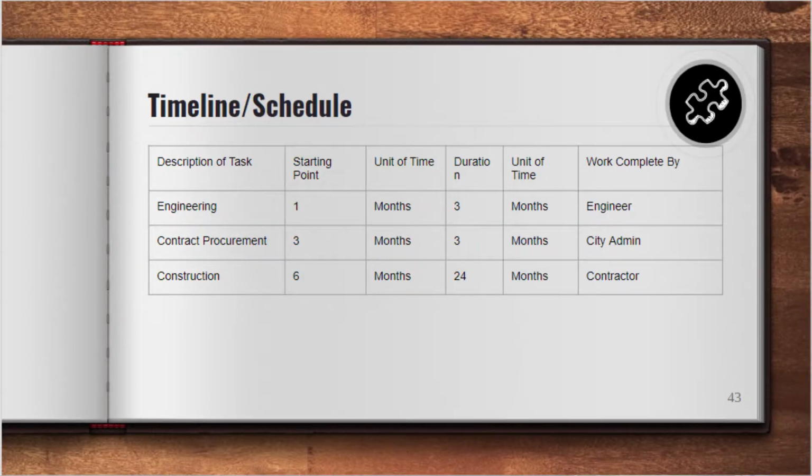Copy of the table, and then say, this is what we're going to do. We can only do construction in the summer, so that will affect your timeline. Put those little things in there so we're aware of that. It makes FEMA aware of it, because then FEMA knows if they don't award the grant until like November, well, you're not going to start construction until May or whenever the snow clears up. So that's just good information to have if we have to do a time extension.